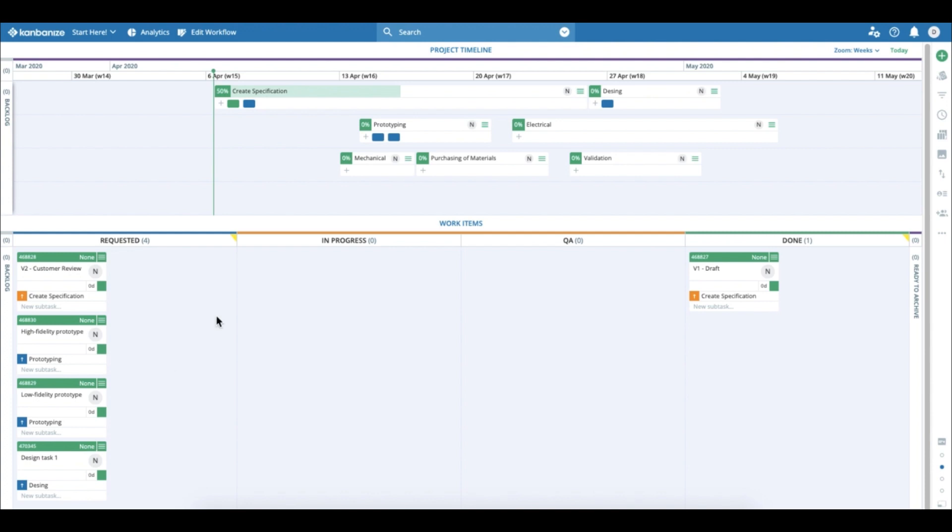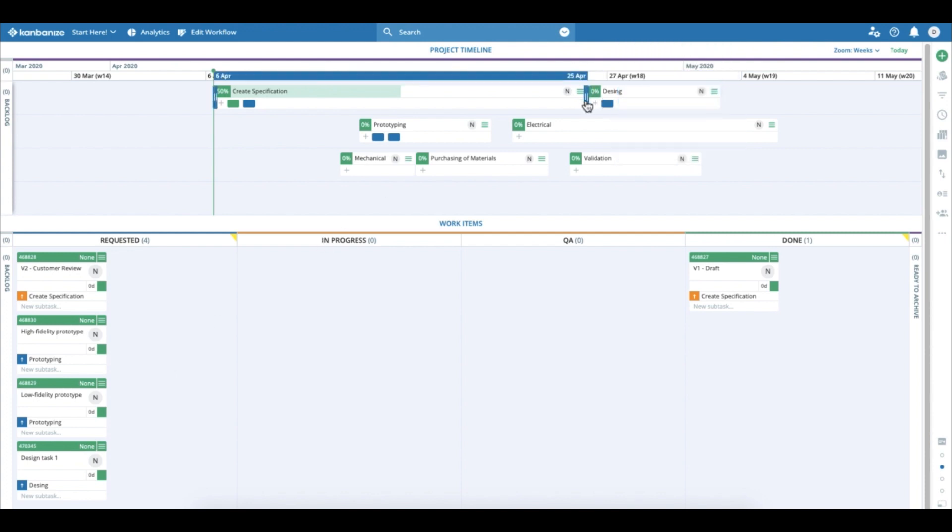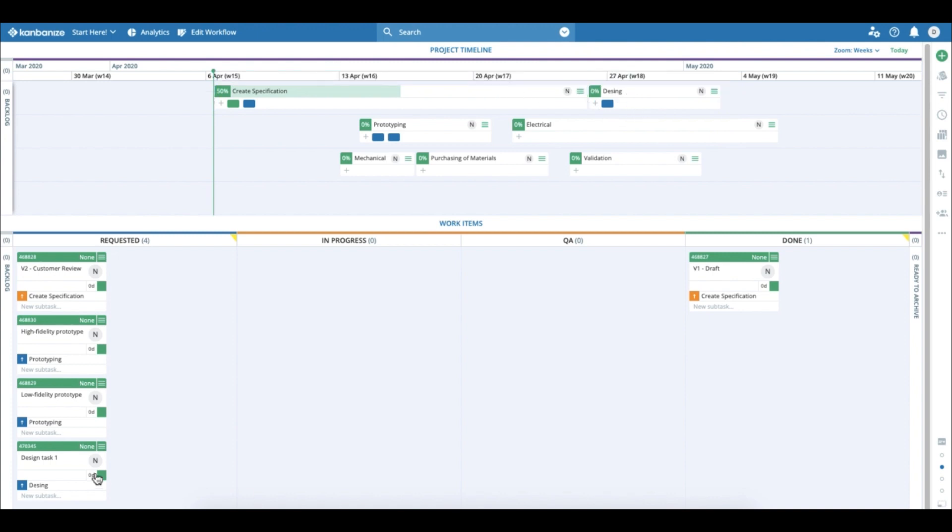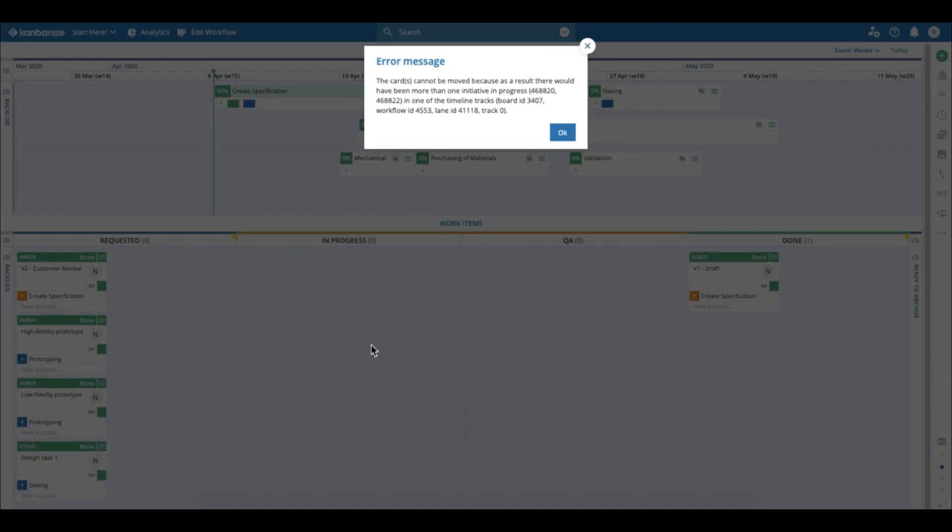Now if I want to start it, the system will not let me because design can only start after the specification has been done. So the system gives me an error.